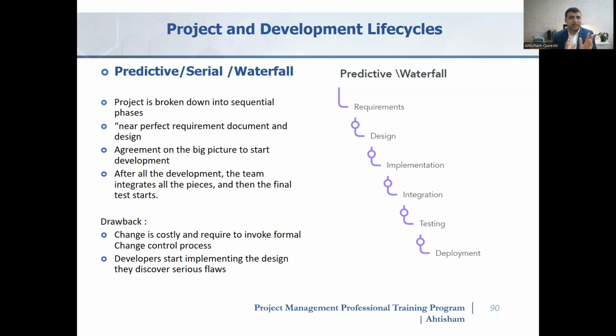And we talked about this: if there is a change at the requirement stage, we can handle the change. But after that, if the requirements are collected and design is prepared and implementation has started, then the change can be incorporated, but it will cost us hugely because we have to do a lot of design change. So we do not welcome change in these kinds of life cycles. And also we can develop software by using this approach. We can raise buildings by using this approach.